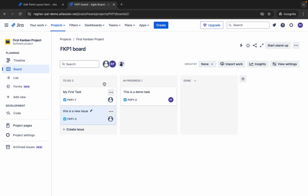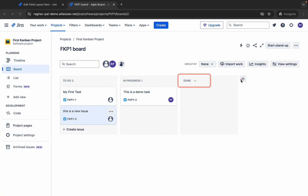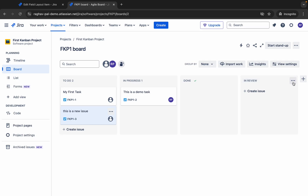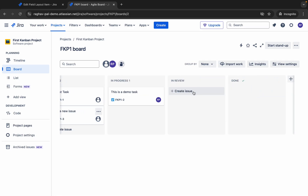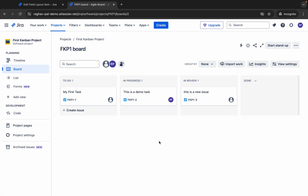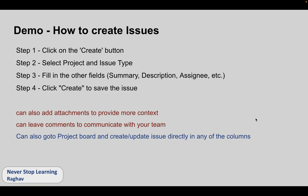Just one more thing — in case you want a different workflow: currently the workflow goes from To Do to In Progress to Done. If you want to add more stages, you can go here and create a column — for example, I'll add In Review and it gets created. I can also move it to the right position. We will learn more about this in the workflow section, but you can also change stages directly from the project board.